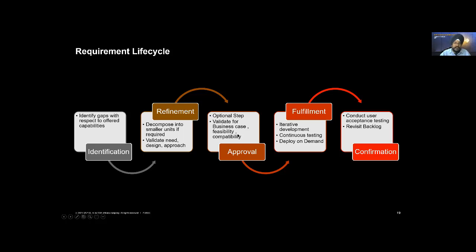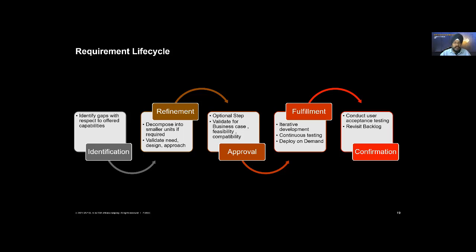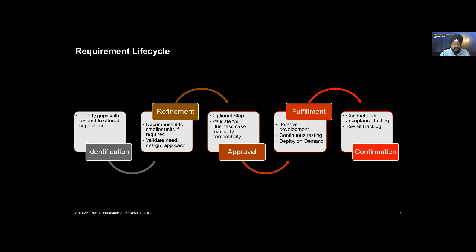As part of refinement, you want to break requirement into smaller units. This is where you break requirement into user stories. You can even break user stories into subtasks. You can spread them over different time boxes and track them. That's part of refinement. A very interesting take is I've kept approval after refinement because at least how we work, management wants to know one more layer of details before they approve. In some cases, approval can come before refinement. The good part is you don't have to follow this linear flow. Approval actually runs parallel to the status. Approval has no direct impact on status - it's an additional detail along with status. This flow is definitely met, but if you want approvals before refinement, you can do that easily. Approval is an optional step. What happens after approval is you get a sticky label 'approved', which is very visual. That's on your screen.